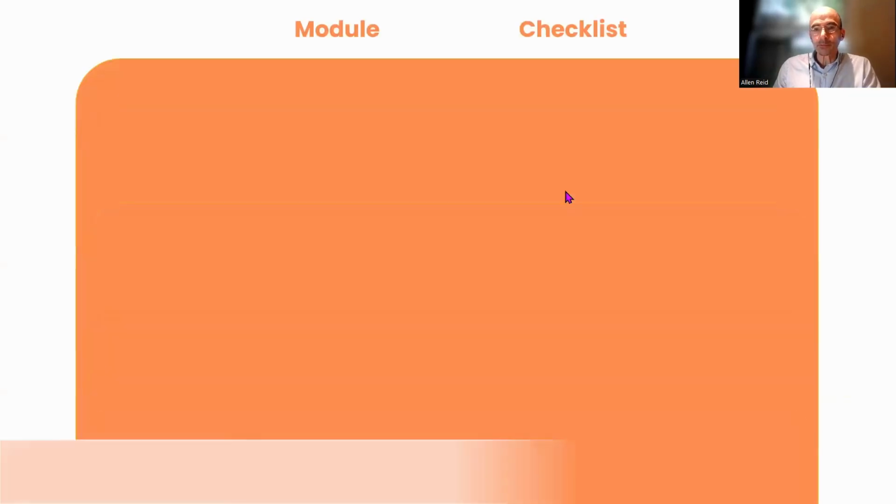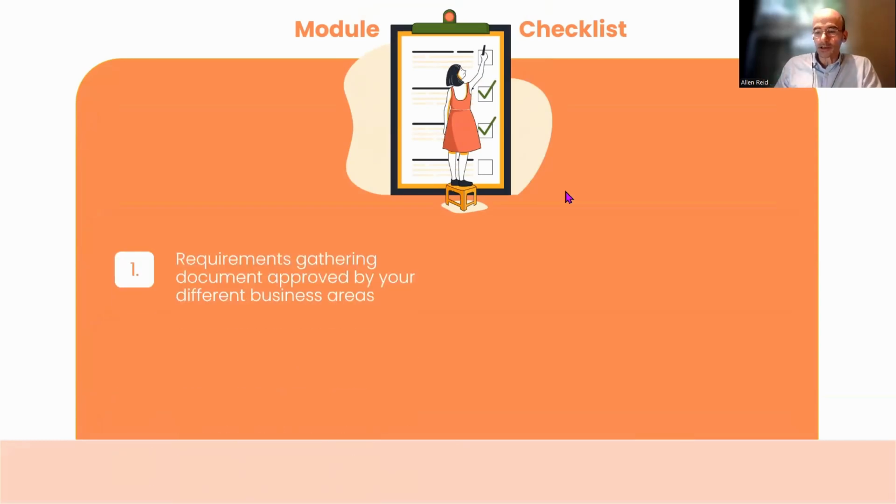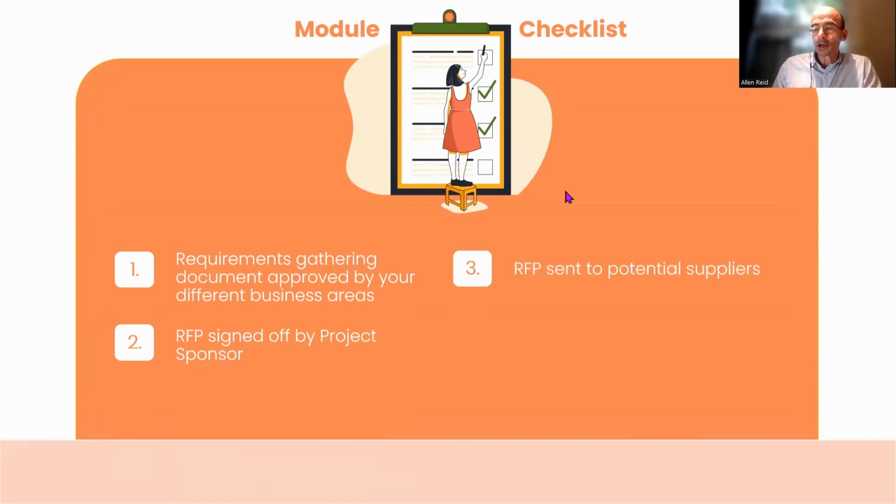Okay, moving on from there. Here again is what we think of as a very handy checklist for you as part of this phase. Before you can move on to the next part, are your requirements approved by your different business areas? Has your project sponsor, normally your senior leadership team member who's leading on the project at that level, signed off and said, yes, we're happy, this makes sense to me, and if this is delivered, this is therefore a good project? Then of course you get to send it to your potential suppliers, and as part of that you're considering who your potential suppliers are.